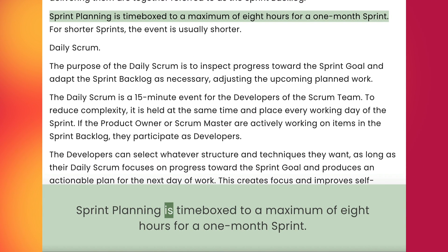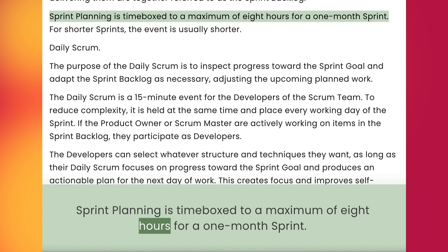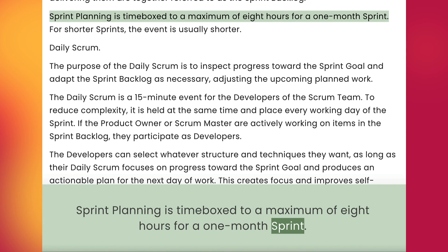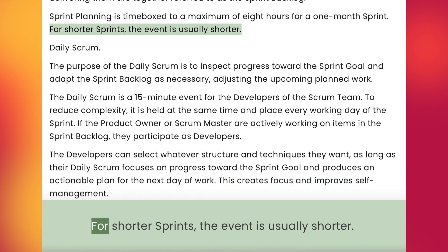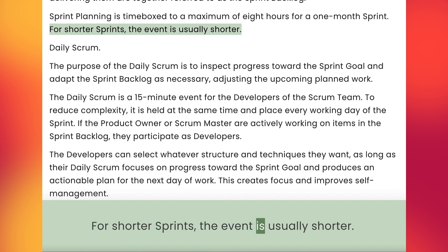Sprint planning is time-boxed to a maximum of 8 hours for a one-month sprint. For shorter sprints, the event is usually shorter.